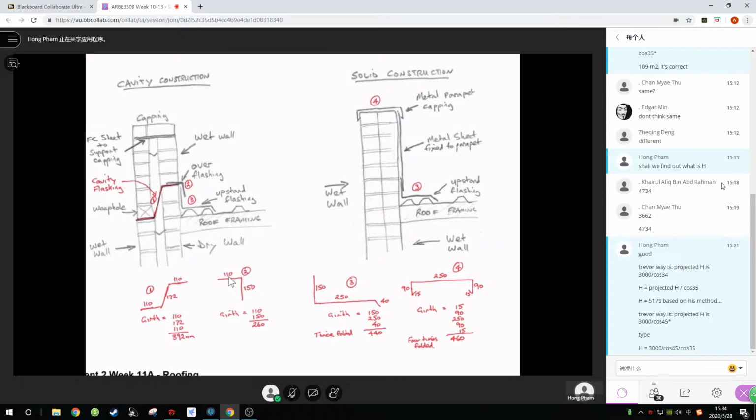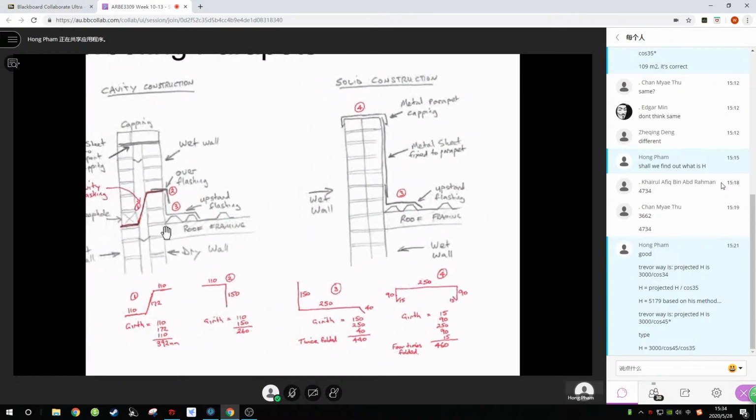Now you have to realise that's a common scenario wherever you've got a roof joining a wall. Wherever you've got a roof joining a wall, you'll have an over flashing and an upstand flashing, and you've got to know about those, because very, very rarely will they be drawn. And a cavity flashing is where you've got a cavity that comes down into the inside of a building. You've got to stop that water coming down the cavity into the inner skin below the roof area.